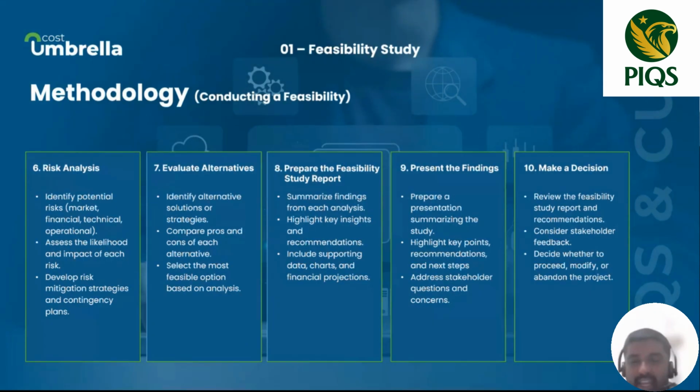Risk analysis. Very, very important topic, right? Risk management, risk analysis, enterprise risk analysis, right? You have data that is about the future. For example, let's talk about the legal aspect, legal feasibility studies. You identified there is a chance the government will change the procedures or regulations in future because some developed economies are changing like this. So this is an assumption or maybe a prediction. Now you have to assess whether that will happen or not.